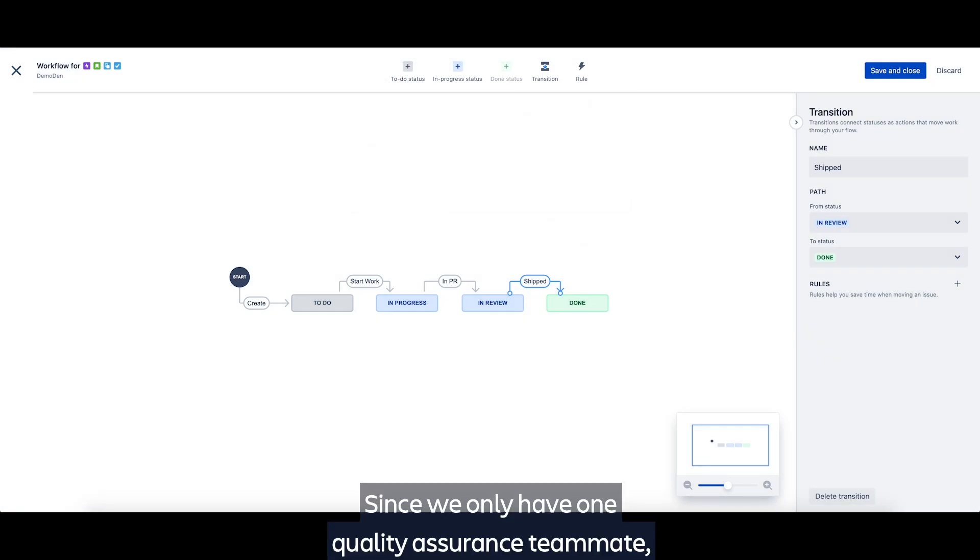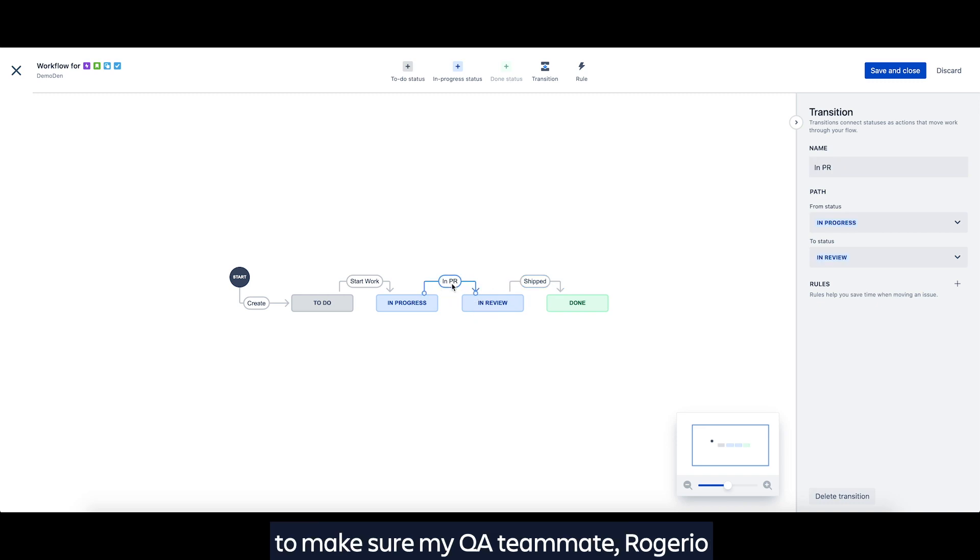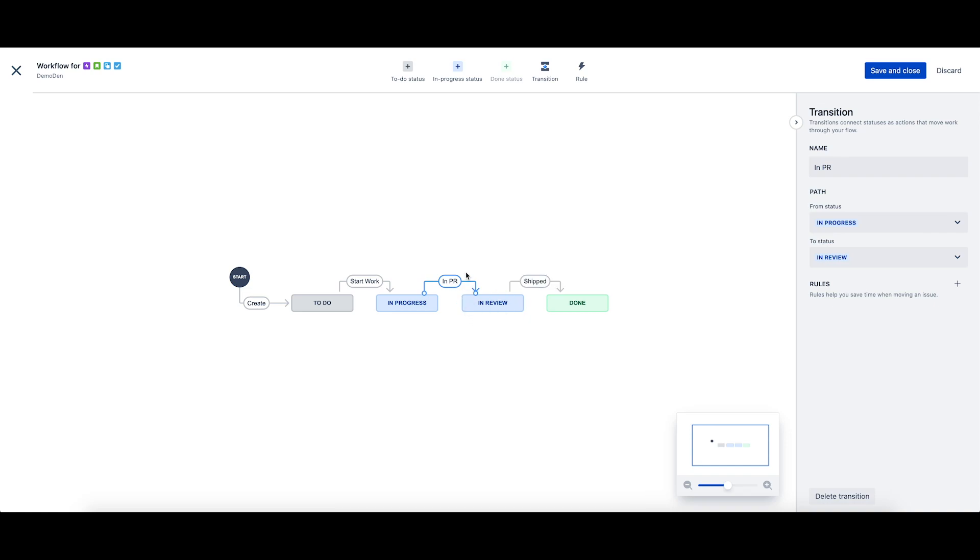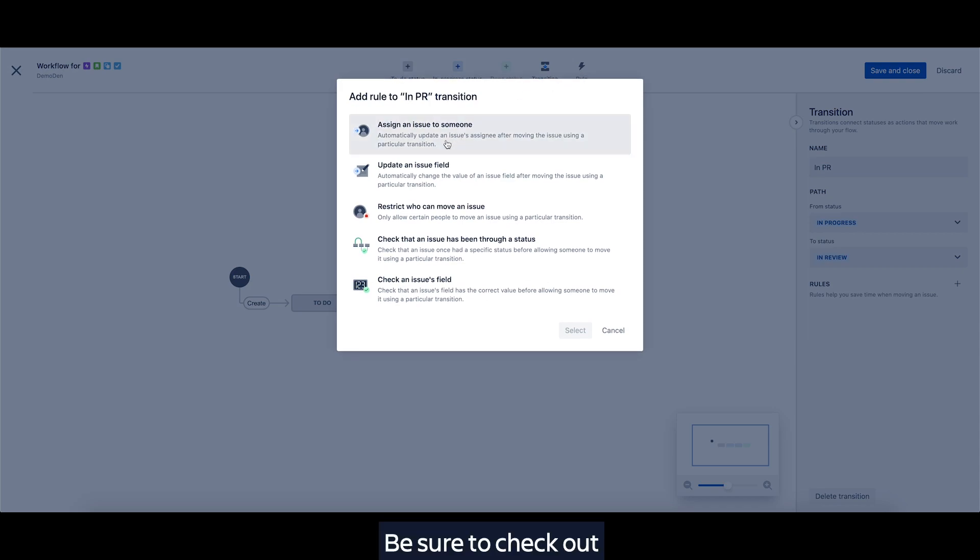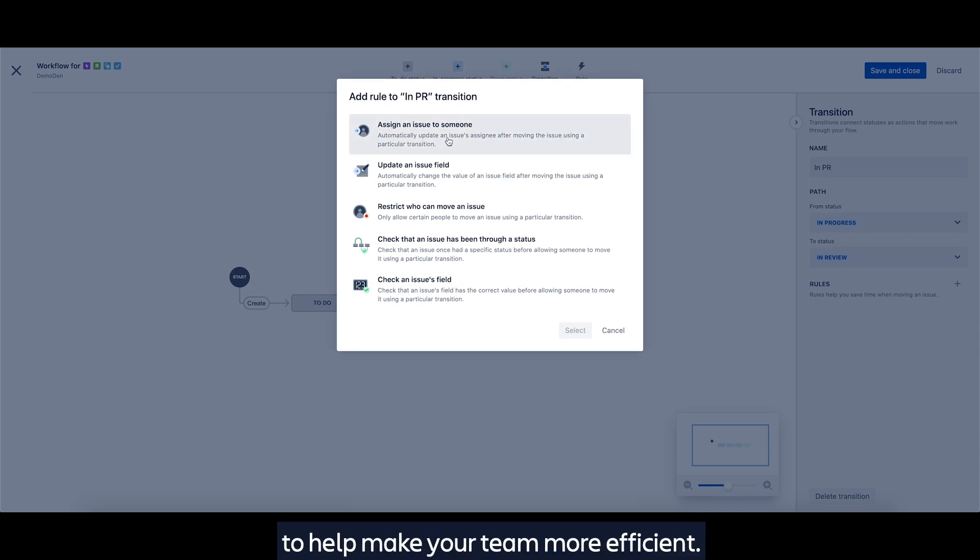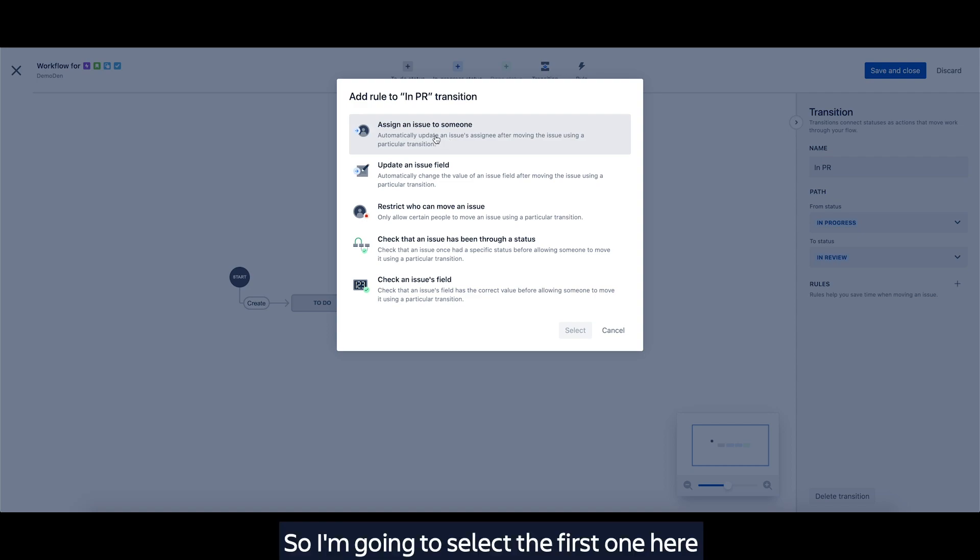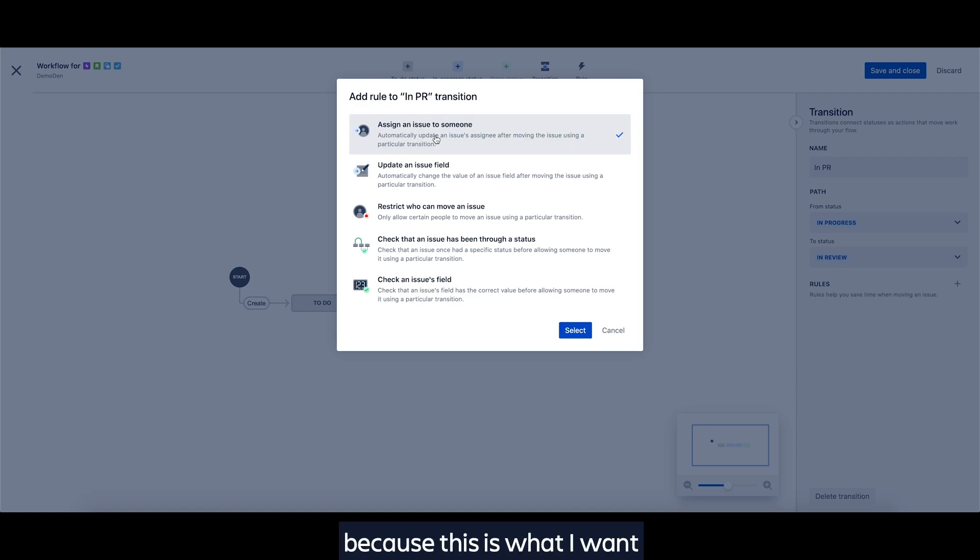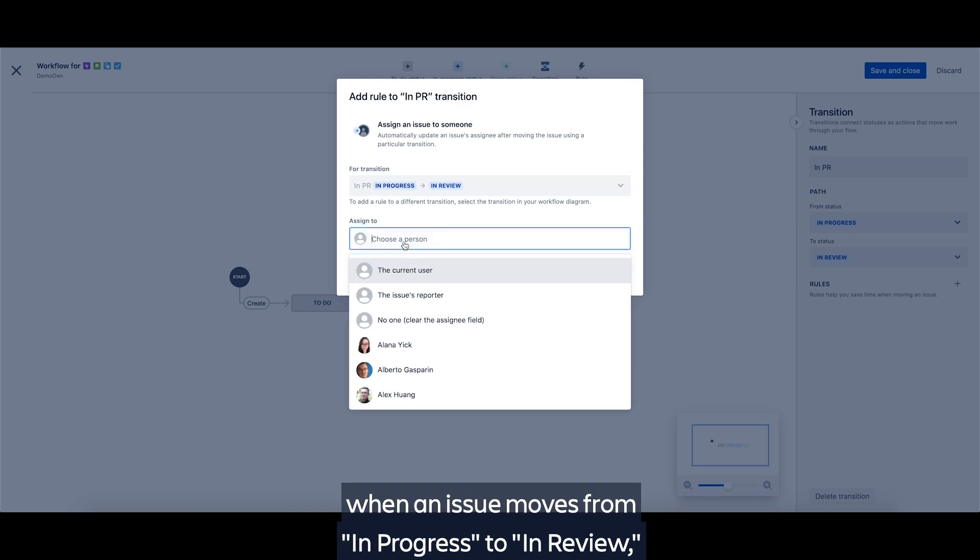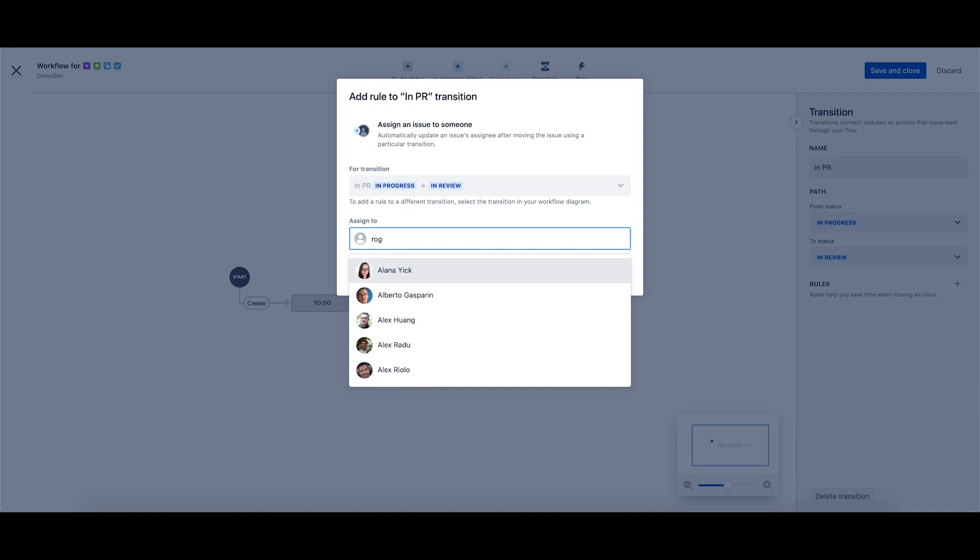Since we only have one quality assurance teammate, I will add a rule to this transition to make sure my QA teammate, Rogerio, gets notified when an issue enters the in review status. Be sure to check out each of our five available rules in next-gen to help make your team more efficient. So I'm going to select the first one here because this is what I want. When an issue moves from in progress to in review, I must assign it to Rogerio.